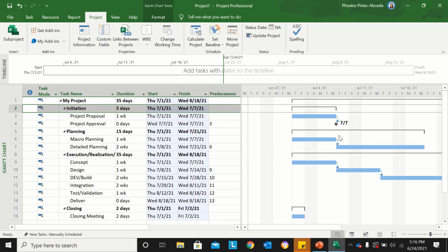You can see that there's an arrow as part of this graphical representation, which indicates that this task is happening prior to the next task. That's why there's an arrow. So there will be a sequence and dependencies as needed, based on what you set on your project plan or your task plan.